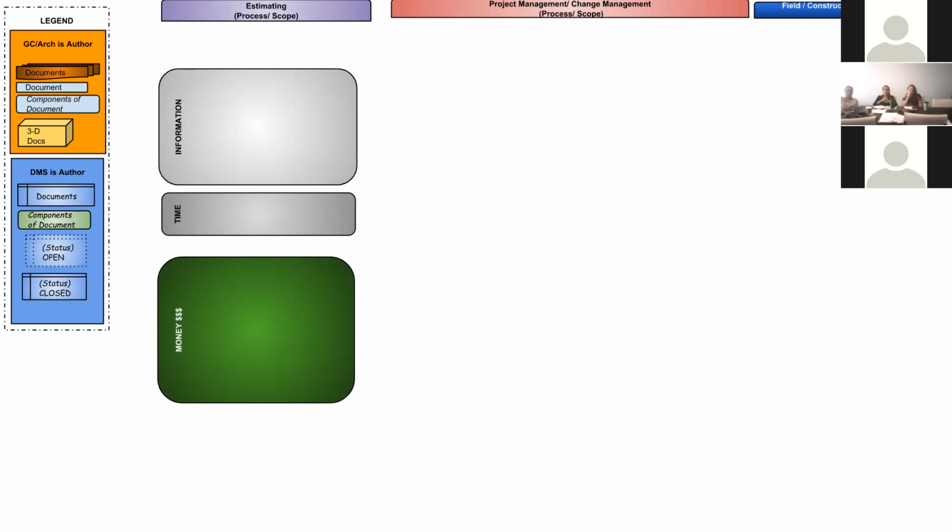So from the estimator, this is what Chris and Ben and John and Dave Schmidt and myself all work on, the estimating process. So the general contractor asks us to bid a project. They'll send over some drawings. They'll send over specs. So the drawings are a visual representation of the project. Specs are the manual, or think of it as the recipe of how to build the project. And then there's usually a lot of safety documents and safety requirements.